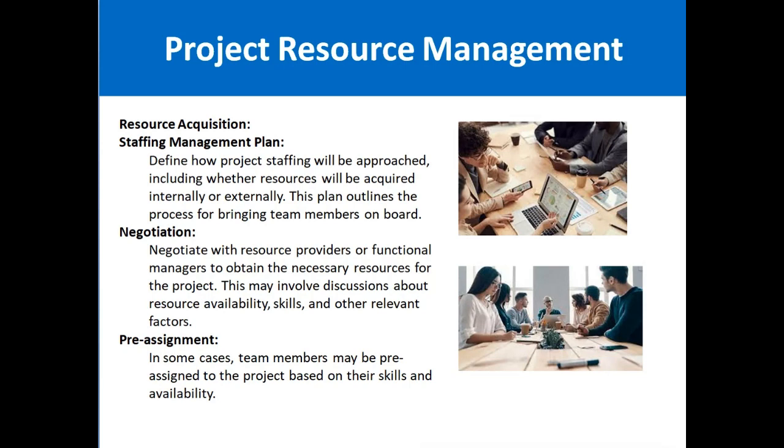Then negotiation means that you, as a project manager, will negotiate with the functional manager or the reporting manager that you need these resources, and this may involve discussions about resource availability, skills and other relevant factors. For example, you need a senior software developer and two junior developers. So you would definitely sit with the functional manager and tell them that you need these types of resources.